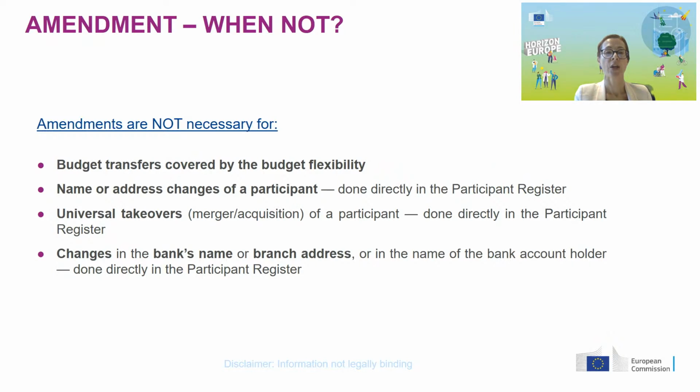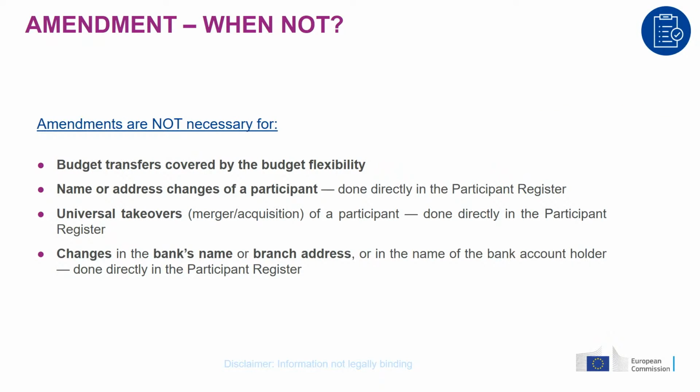Now, another type of change that does not require an amendment is the changes which are minor, like the name of a participant or its address. And this you can do simply by making the change in the participant register.